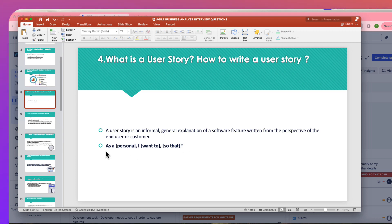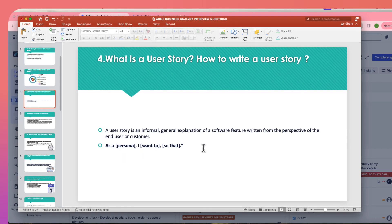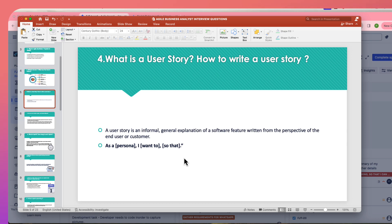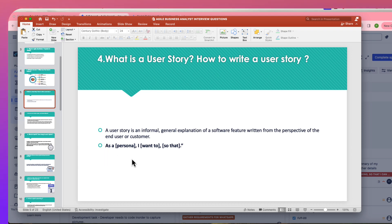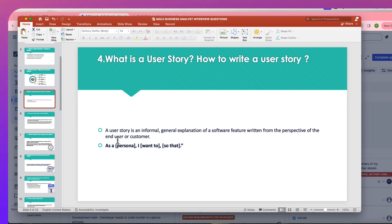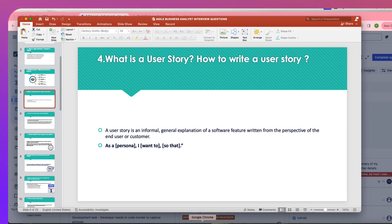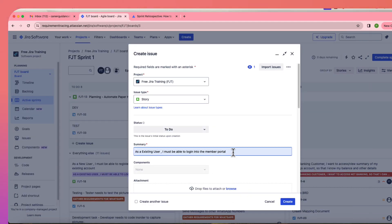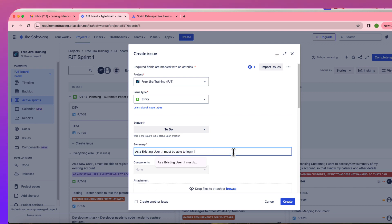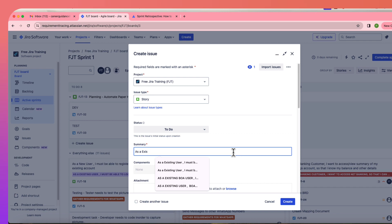The format of a user story is: 'As a [user], I want to [action], so that [goal].' For example: as the end user, I want to log in so that I can see my account page; as a new user, I want to get access to my bank account page; as an existing user, I want to update my personal information.